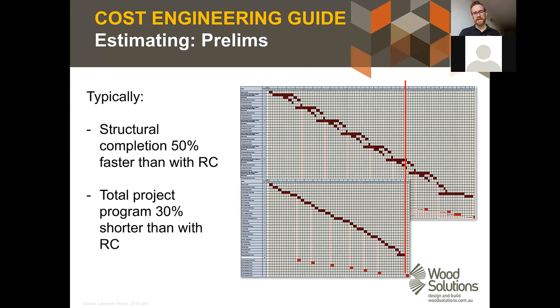So we typically find timber projects are prefabricated, typically in a warehouse environment, and the process on site is an installation process. It's assembly. It's not construction, it's just assembly. We typically find these projects do come in quite a bit faster than a comparison in situ concrete project. So here you can see, this is from our Tech Design Guide 26, I think. The timber option came in about 30% faster, and that's quite common. We've seen that quite a bit in the industry.